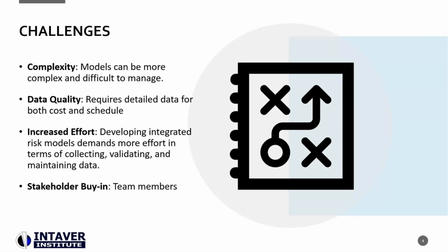Inaccurate or incomplete data can lead to misleading results. Properly accounting for time-dependent versus time-independent costs is one example, because it's possible to double count the impact of time on the cost results.